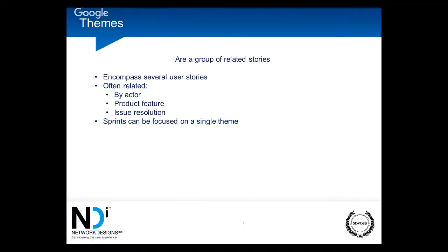If you have multiple issues in a single theme, and they all are fixed by the same database change, then they are all related by issue resolution. So your issue resolution is the theme to collect all of those different issues. If we look at user stories, every user story that relates to the system administrator is in the system administrator theme.